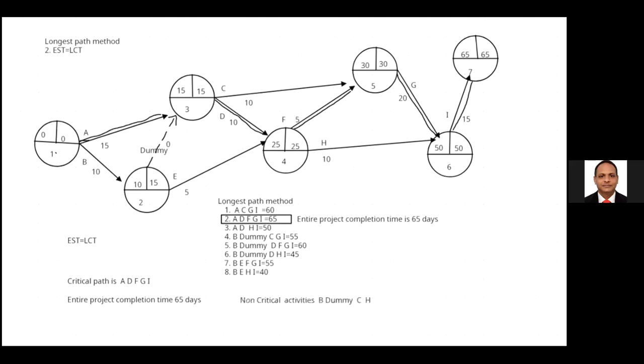Remember, you can't delay any critical activity. If you delay a critical activity, it affects the entire project completion time. You can write that down.